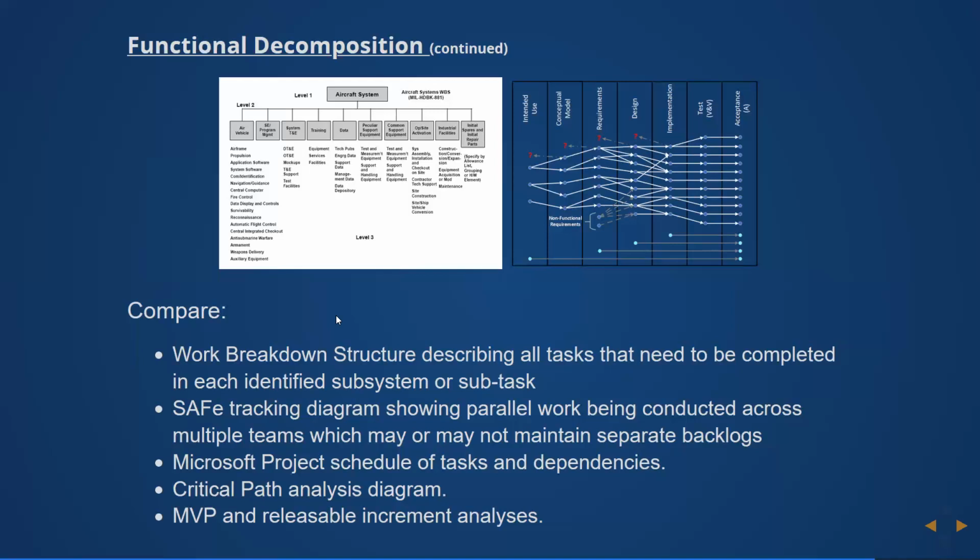If you look at a giant Microsoft Project layout, that might have all the tabs in a schedule, and that might show dependencies. And based on that information, you can plot out the critical path, to say what's the longest this process should take, and where am I running into a problem as far as getting deliverables out.